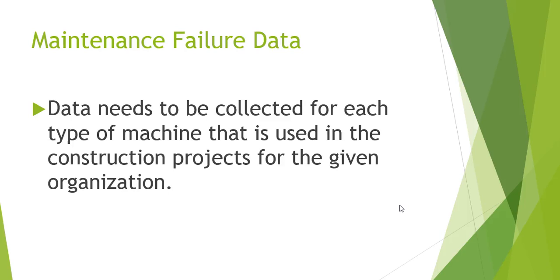Remember, there are lots of pieces of equipment we've been looking at that are used on a construction project, and the failure of any one of those pieces will at a minimum cause a delay. It might be just a short delay, but again, that goes into that wasted time we've been talking about. But you also can have major failures where the delay will be extreme, and where it can cost the